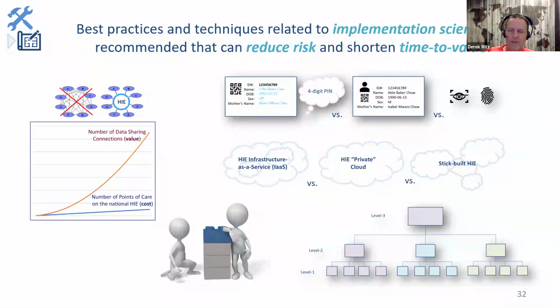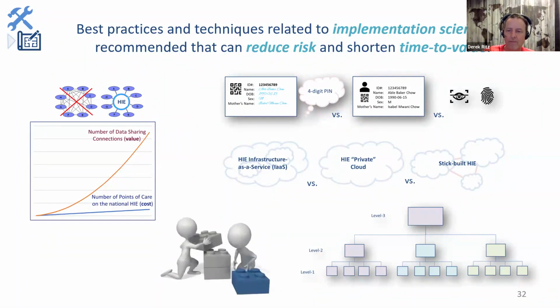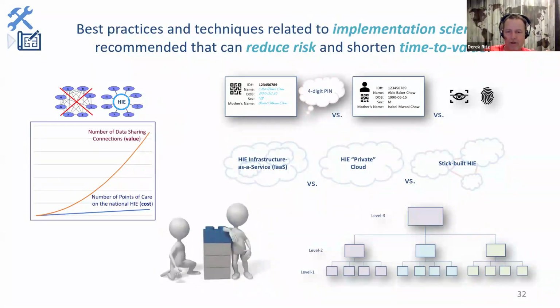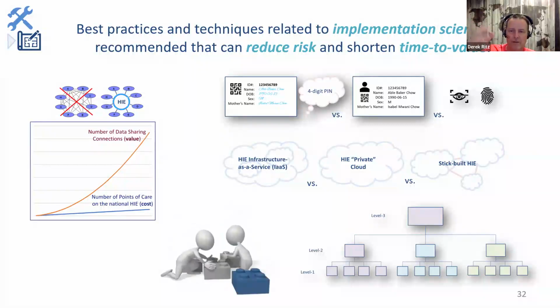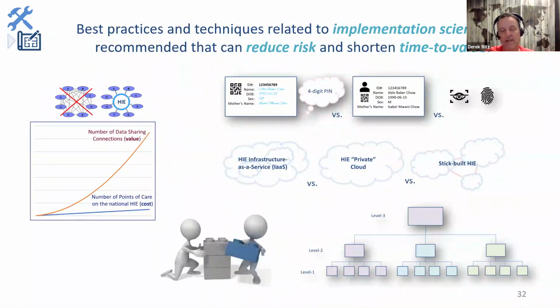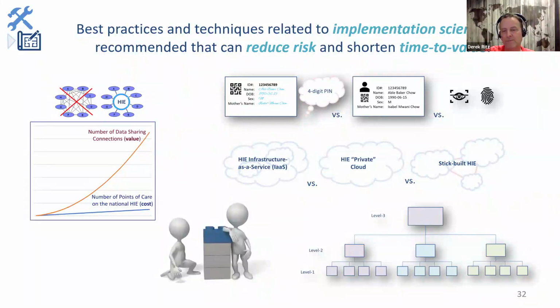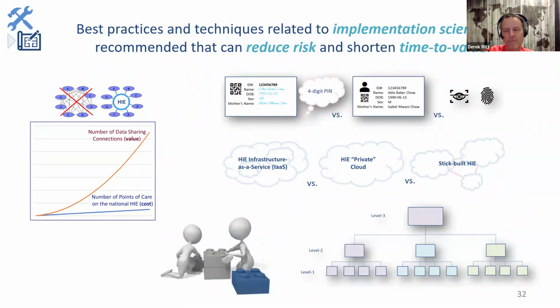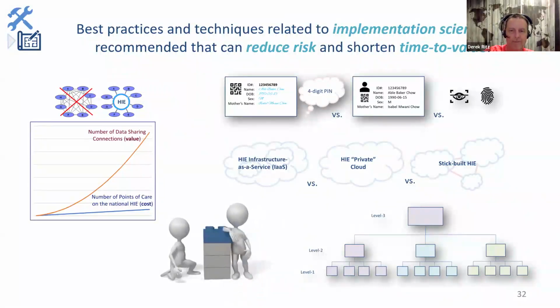In the bottom right, I'm showing critical slice implementations. If you have to implement something first, implement an entire referral network: all of the little clinics, the district hospital, and then the regional hospital. And that way, you can do an entire course of care. You can do diabetes care, actually, if you put in place the clinics through the referral network, and then you put in pharmacy and you put in lab.